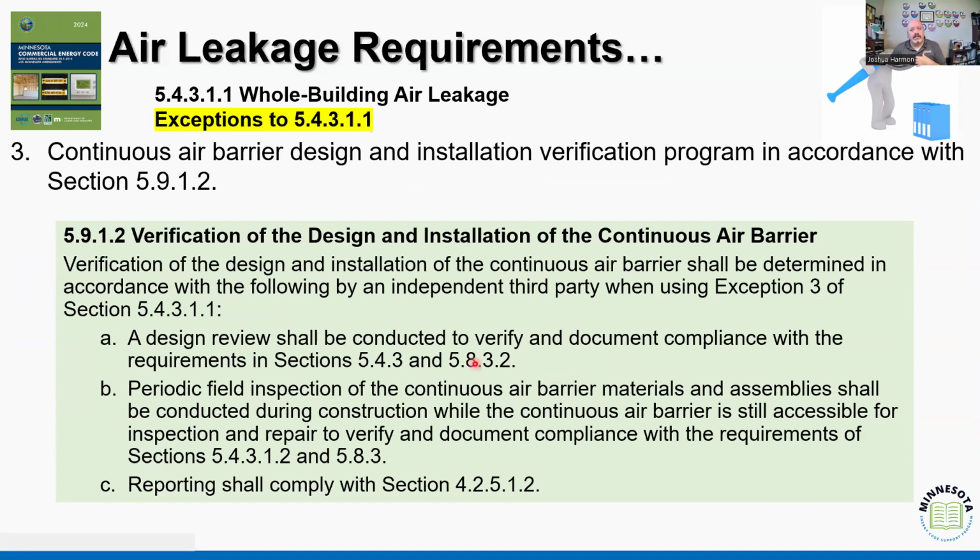They verify that we've identified the appropriate materials, whether that's part of an assembly or a material based on its air leakage, and that they performed periodic field inspections of the materials and the assemblies being installed to verify that they're properly installed and properly sealed, right? And then they reply back with a report, right? So again, we could have a commissioning, or I use that term lightly, a verification report of our